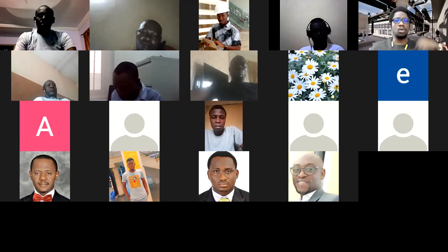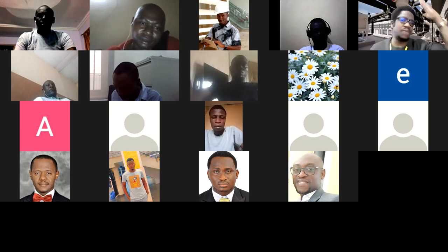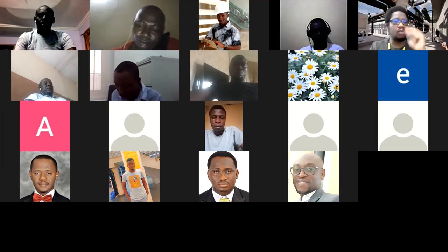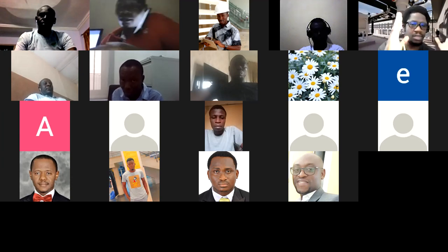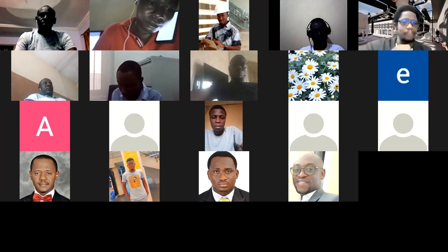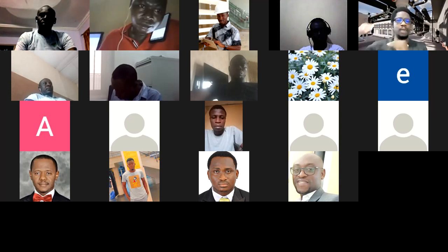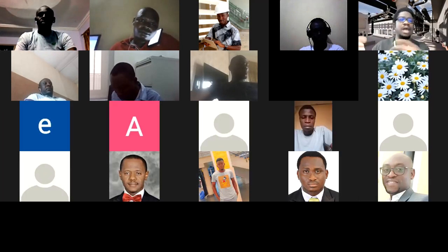Every time you send a procurement request for maybe a TV in the conference room, oh, please give us a 55-inch color TV for display in the conference room. You have abdicated your procurement requirements. There are at least 15 line items to describe the kind of TV you are looking for. Put those descriptions down carefully and say, this particular spec of TV, it is preferable that you look out to distributors, original OEM reps, like this, who are interested. Or companies that have supplied such in the past, that have been trading this business directly for a long time, or that actually directly stock them.